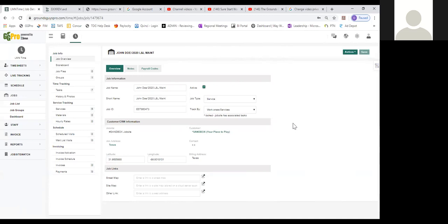And if something comes up and it becomes an issue, and I look at it and say, wait, my labor's off, I spent too much time, or wait, you put down too much product, then those are red flags. That's when I stop and start drilling deeper. What happened here? What was our problem? Is it something that we can fix? And what did we do to ourselves? That's my version of job costing. Problem, reason, solution. Move on.